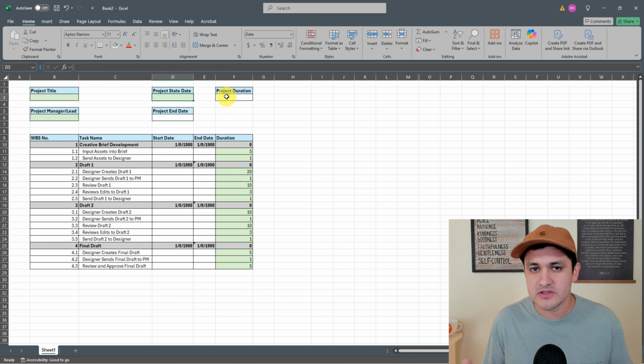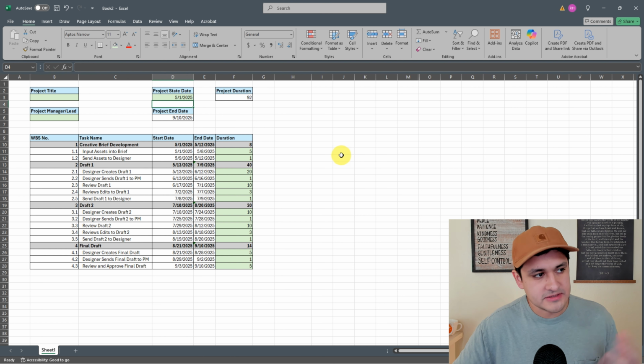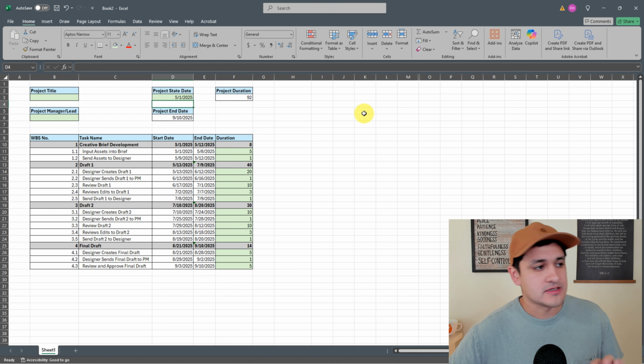When do you think, tentatively, we could have that project completed? Well, let's go May 1st, 2025. It's going to take about 92 business days, customer, and it looks like we can probably get that done somewhere mid-September or so. And this gives you a quick, efficient way for your team to be able to estimate project timelines.